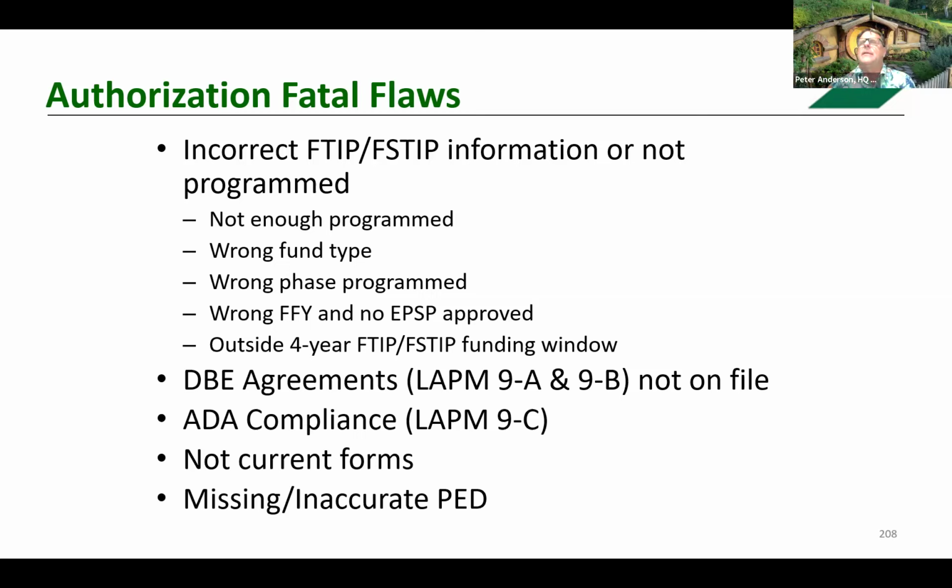The PED, like I said, is one of our critical dates. It is very important that you are aware of that date, and that that date is monitored. We have a tool on our website to help monitor PEDs. But if it's inaccurate, it's probably going to force your hand to do an authorization to move it out. And if it lapses and then gets moved out, you're going to have a gap where you're ineligible for federal reimbursement.